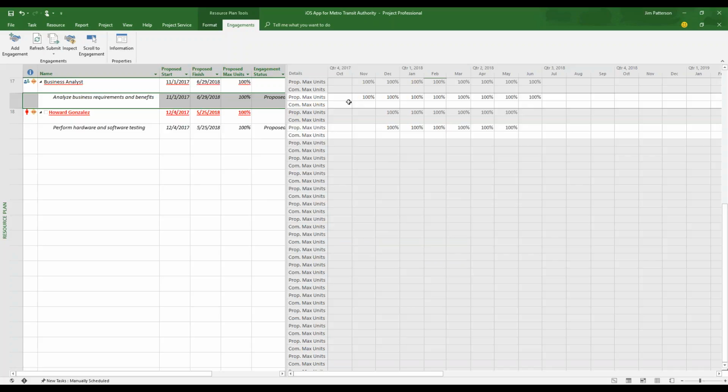Now, in general, we can get more granular if you like. So for example, if I only needed 50% of a business analyst initially, I could actually ramp in with 50 and finish up with that and change the values and stagger that a little bit more like a spreadsheet in this. The idea though is I don't have to, but the idea is I can do this at a very high level type of FTE based capacity plan, okay?